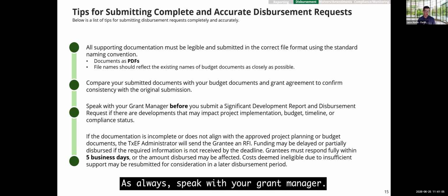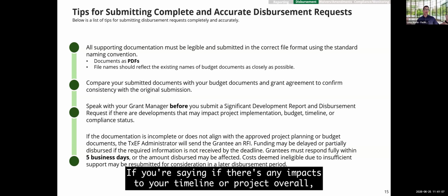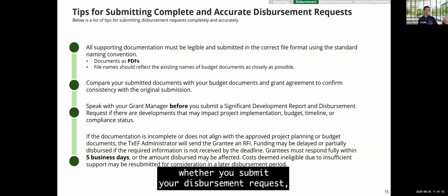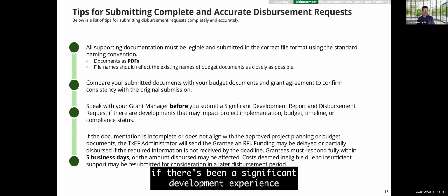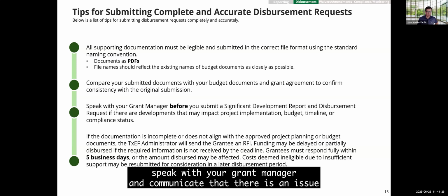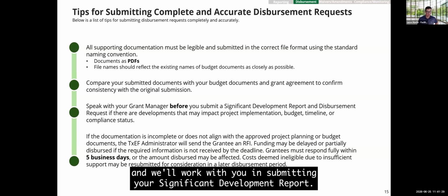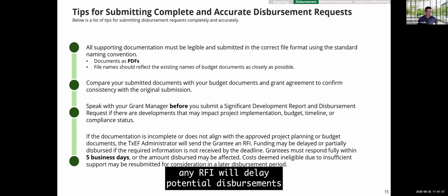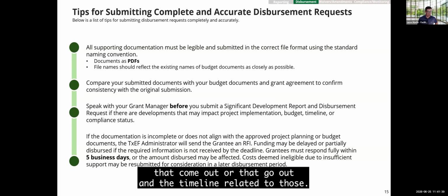As always, speak with your grant manager if there's any impacts to your timeline or project overall, or if you need to submit a significant development report that may impact whether you submit your disbursement request. If there's been a significant development and it impacts your ability to submit a disbursement request, speak with your grant manager and communicate that there is an issue, and we'll work with you in submitting your significant development report. Lastly, again, any RFIs will delay potential disbursements that go out, and the timeline related to those.